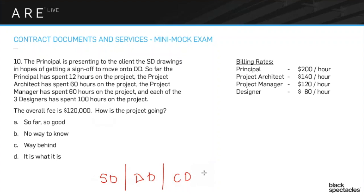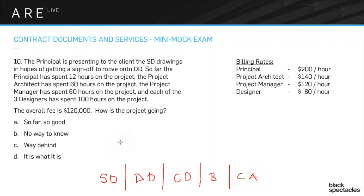For the exam, think of CDs as contract documents, not just construction drawings. After CDs there's bidding, and then CA — construction administration. The term 'supervision' should never be used; use 'observation' instead, because saying 'supervision' means you've taken on all the contractor's liability. Those are the five stages of a typical contract.